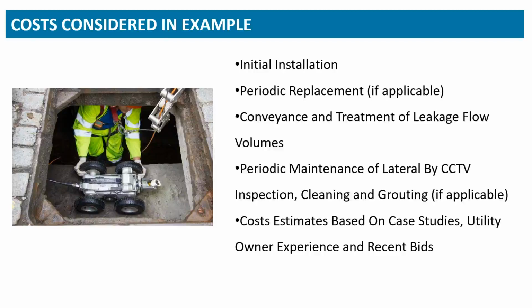As we've discussed, the installation cost up front of getting the project done, to the extent that periodic replacements are required, what's that cost? Projecting the longevity of the approach, how much leakage will come in, it might increase over time, by how much, so you can figure out the cost of conveying and treating that leakage. To what extent do you have to do periodic maintenance of the lateral using CCTV inspection? Do you have to clean it? Do you have to grout it? And then looking at, again, case studies, experience, recent bids, what are the various cost estimates that you could be looking to for each of those considerations.